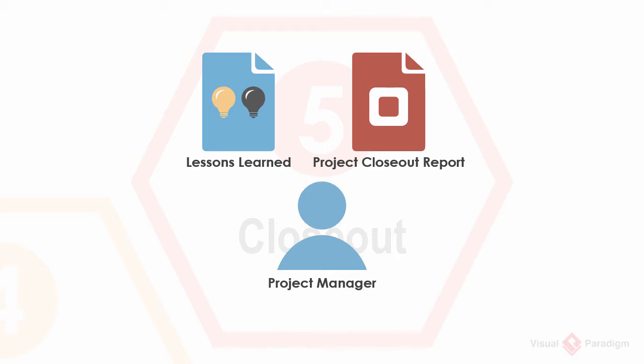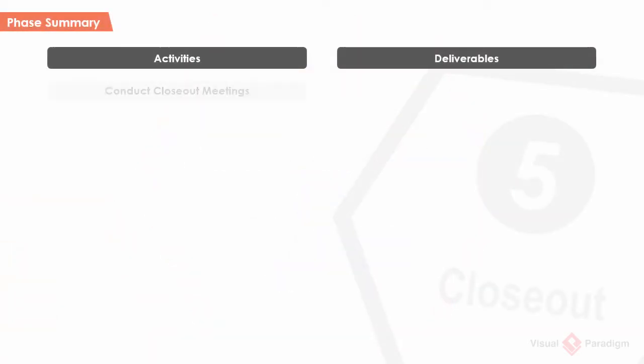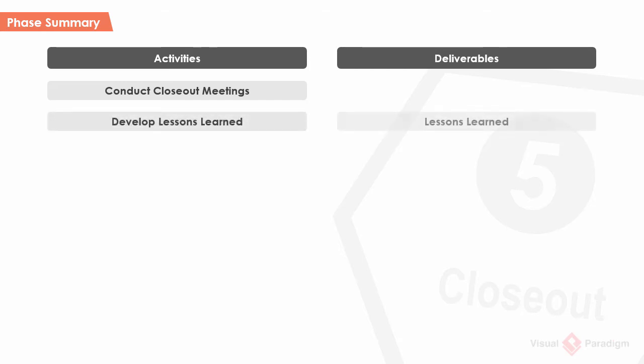Let's have a look at the activities of this phase. The first activity is to conduct closeout meetings with different project participants, collecting and discussing their feedback so that lessons learned are captured. These meetings also help the project manager in developing a plan for project transitioning. With the information collected, the project manager will develop a lessons learned document describing things that went wrong and well throughout the project lifecycle, with recommendations.